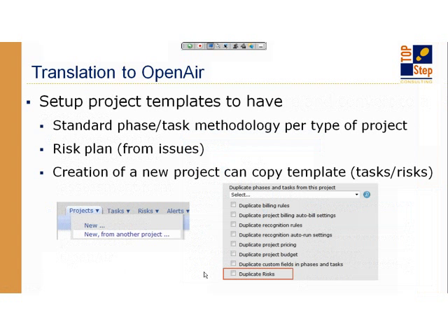So you have risks identified, but what's another opportunity that you have? And this is really the benefit of using something called a template or a template stage in the system. Because if it's a standard methodology, like the delivery methodology of the 4Ds or 5Ds or waterfall approaches that you may have, you probably have a standard set of phased tasks set up to take advantage of. The nice thing about using the issues form as risks is it also gives you the ability to basically set up a standard set of lists, perhaps against the risk assessment form that you're using in the proposal process.